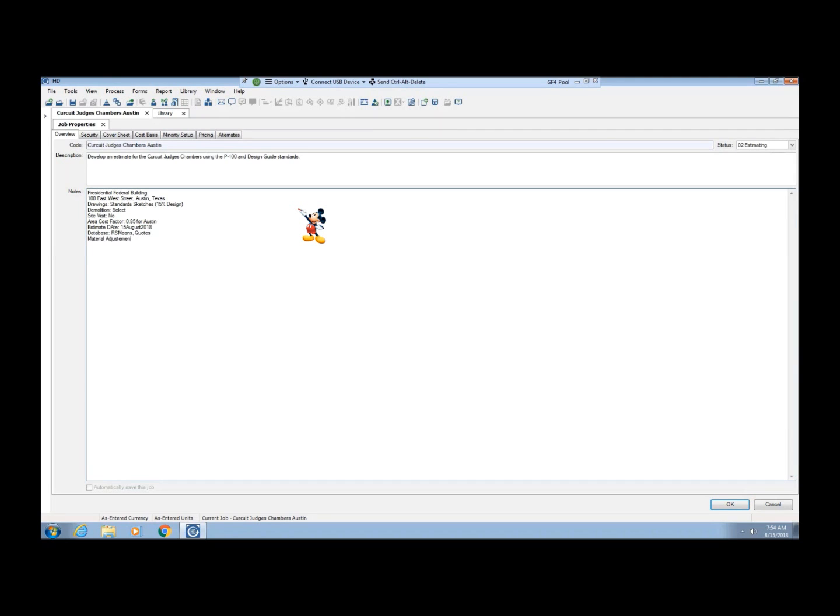The escalation, I put a note in there of what it is and then what it is per year, because the midpoint is likely not going to land on an even year. So you'll have to calculate what the escalation is, and somewhere around 3% per year is a pretty good go-by, but you use what's appropriate. The construction duration, at first nobody really knows, it's a guess.